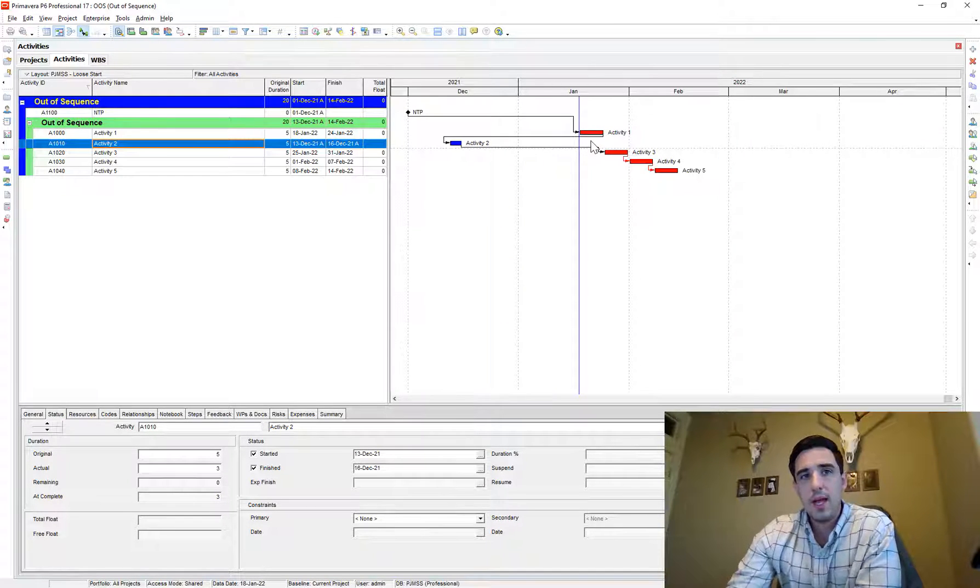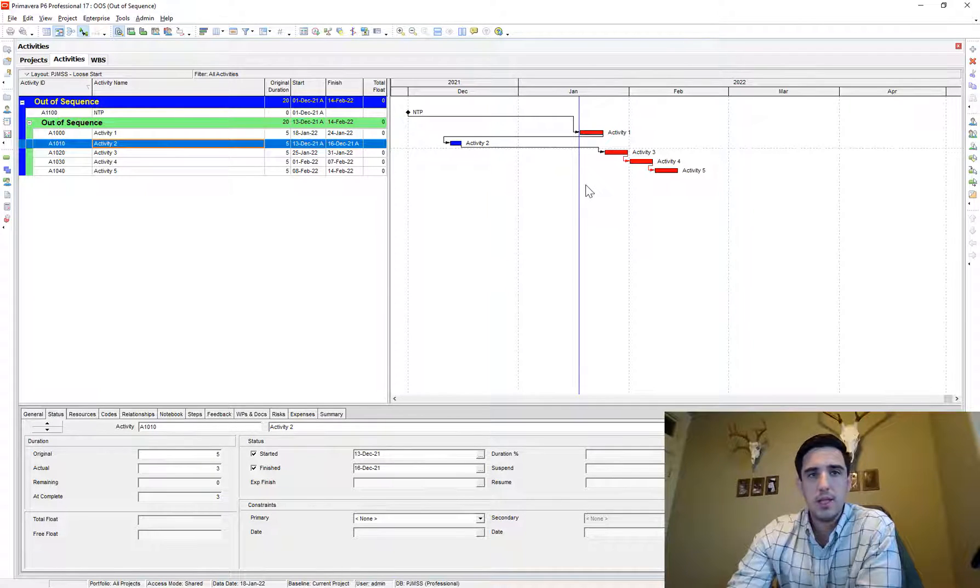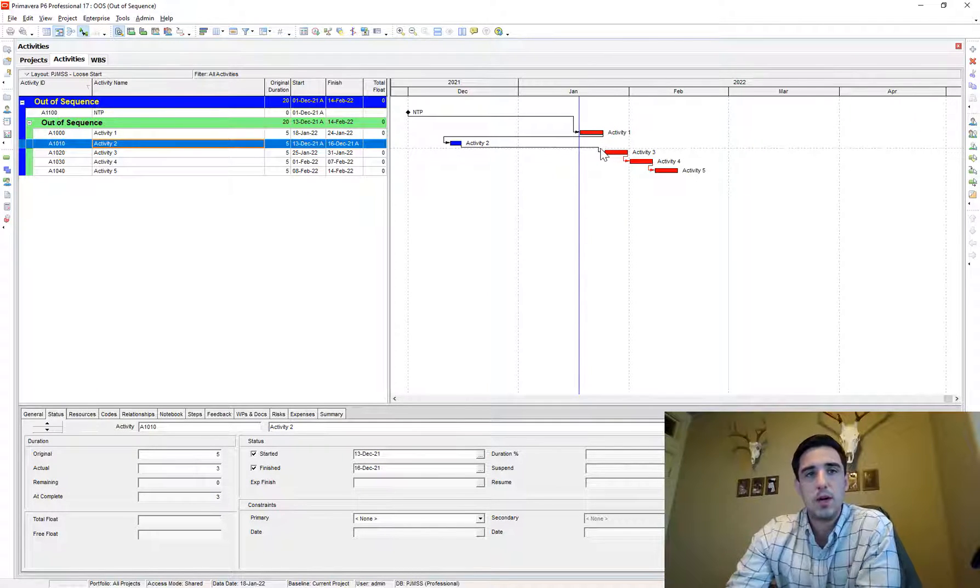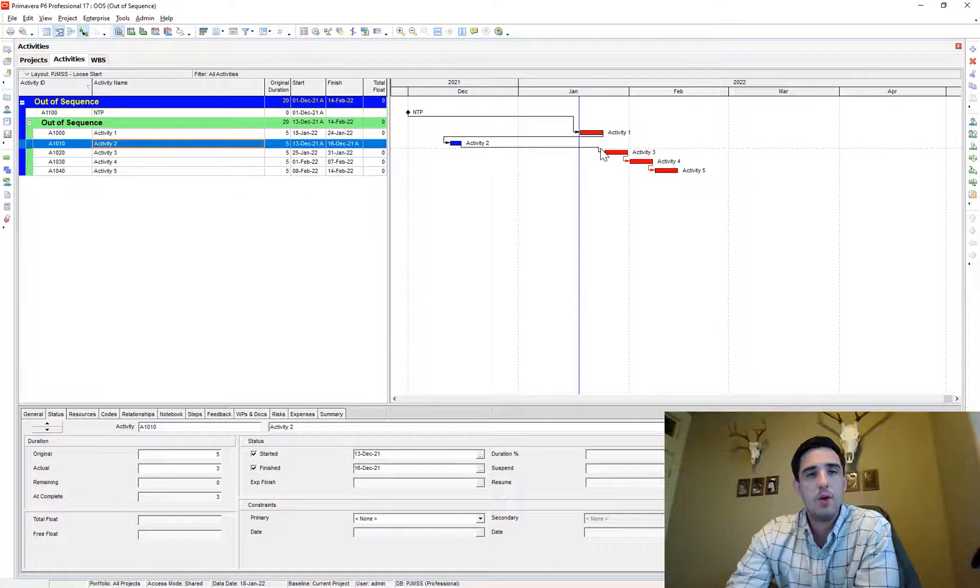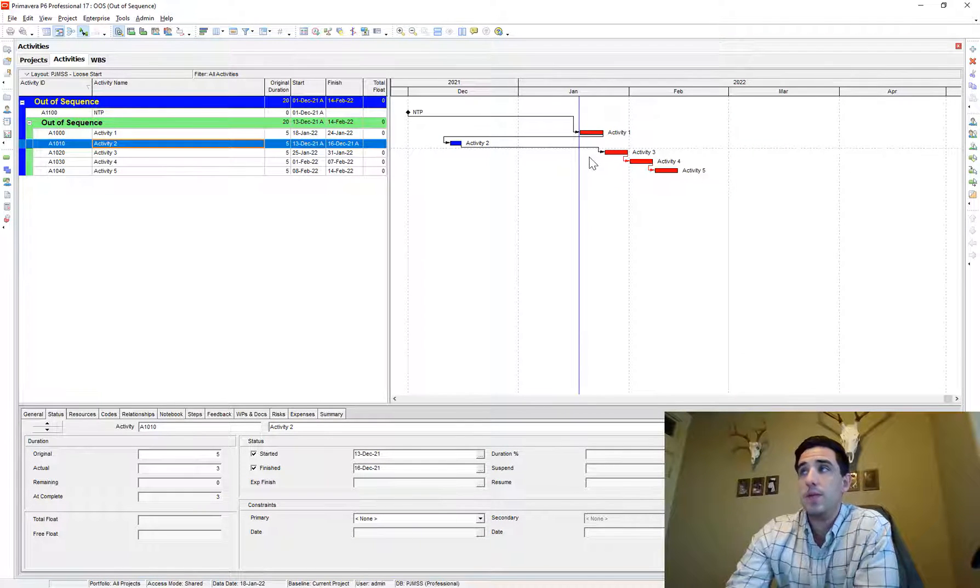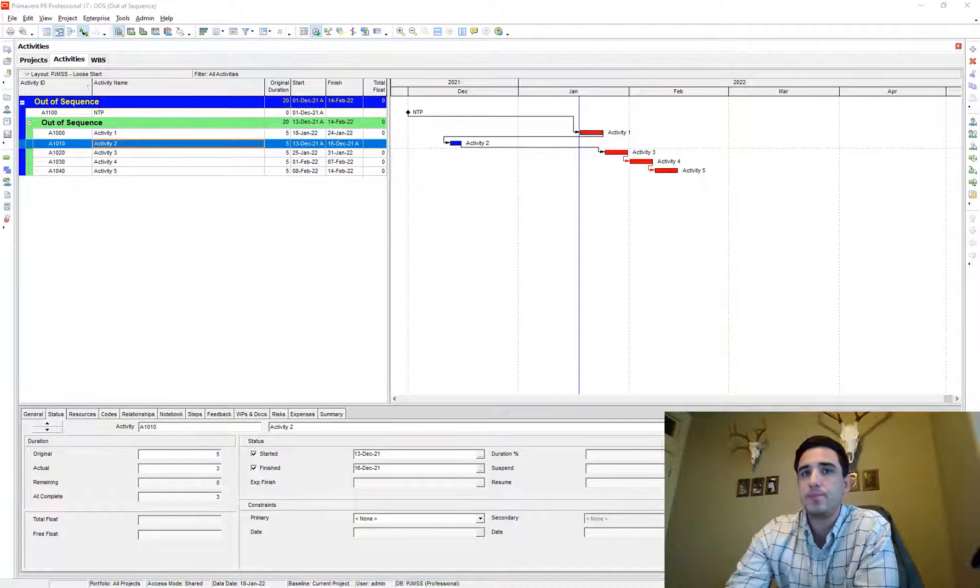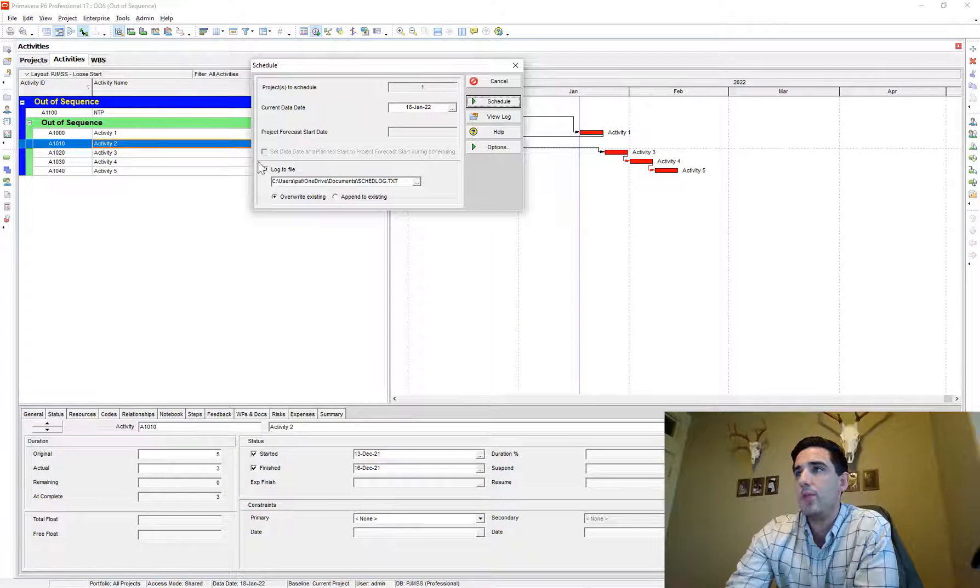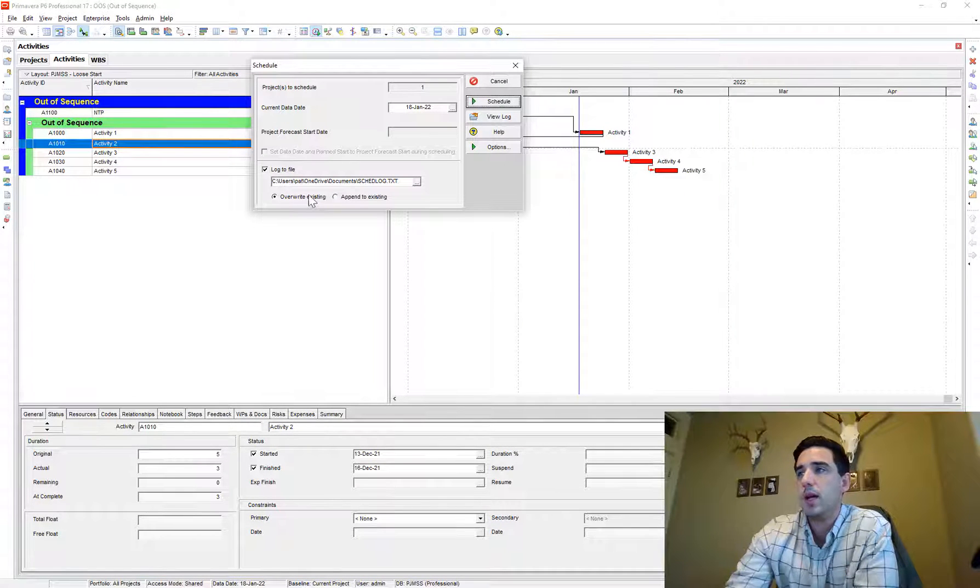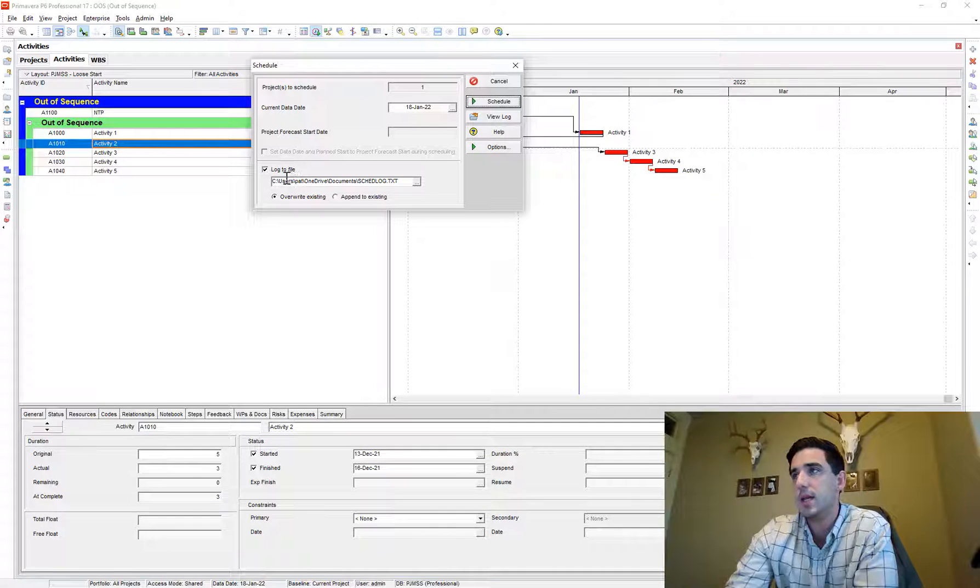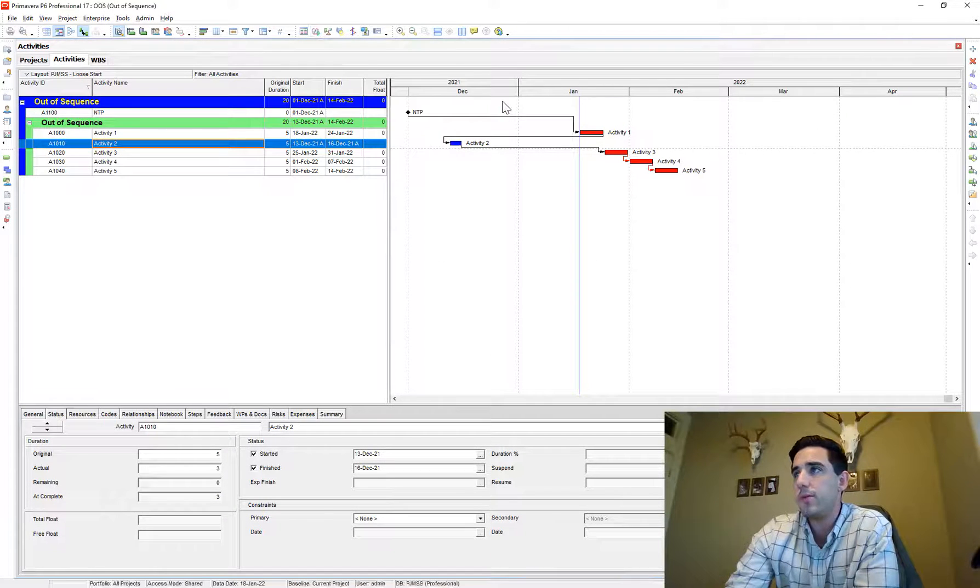So how do we find, if we're using retained logic, we have to correct for those instances of out of sequence progress. Like how do we find those instances? Very simple. We just go to the schedule button, make sure you have logged to file and I say override existing and go ahead, schedule the file.